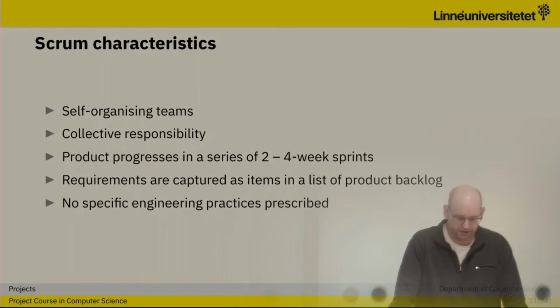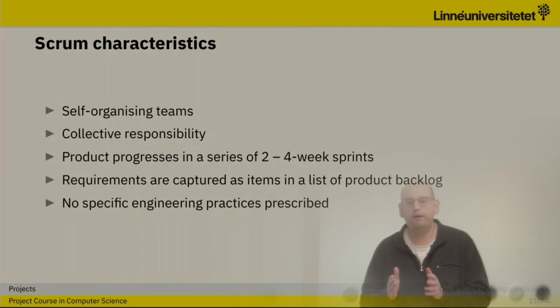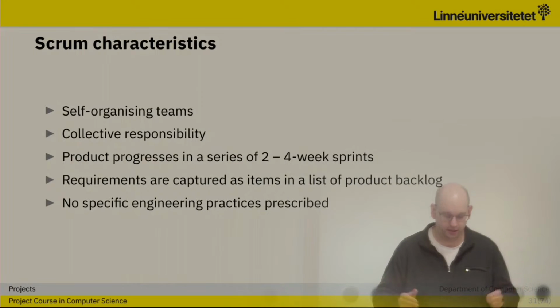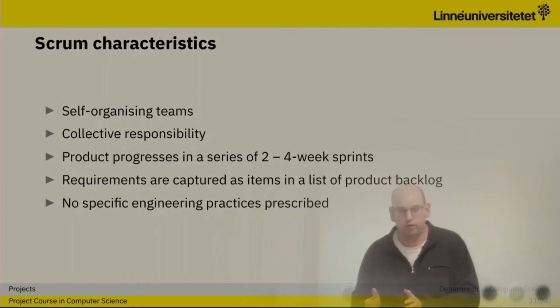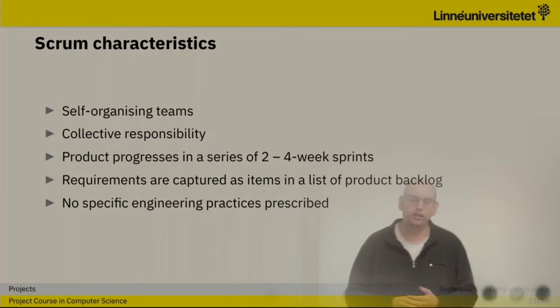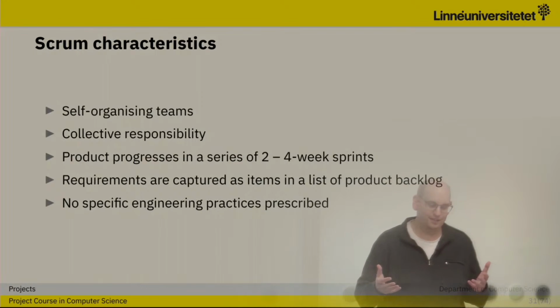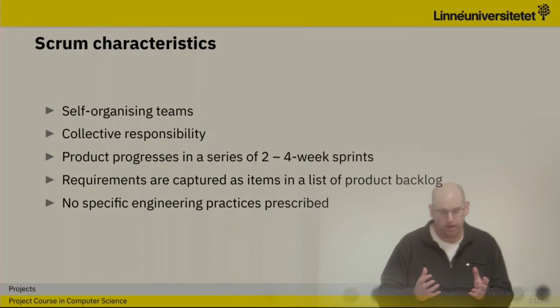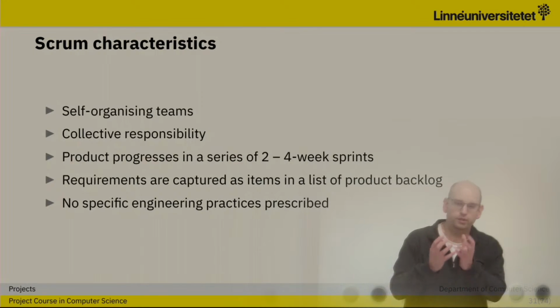The product progresses in a series of 2 to 4 week sprints, meaning that we have sprints of a predefined length. In the case of the course, they will be 1 week. In real life, there will probably be not less than 2 weeks, but probably not more than 4 weeks, as that's kind of a nice time to create something of value that we could show.